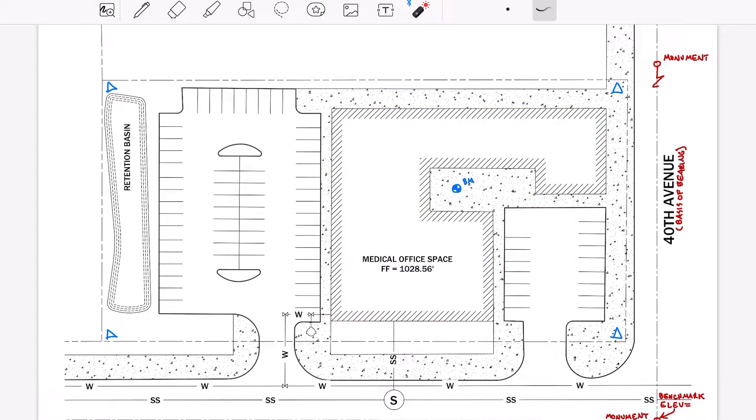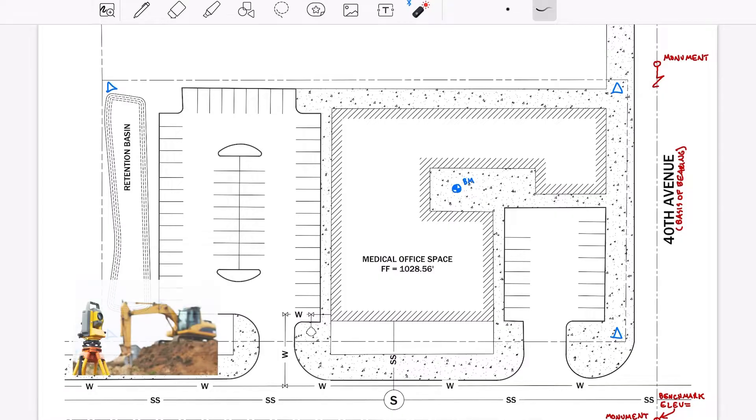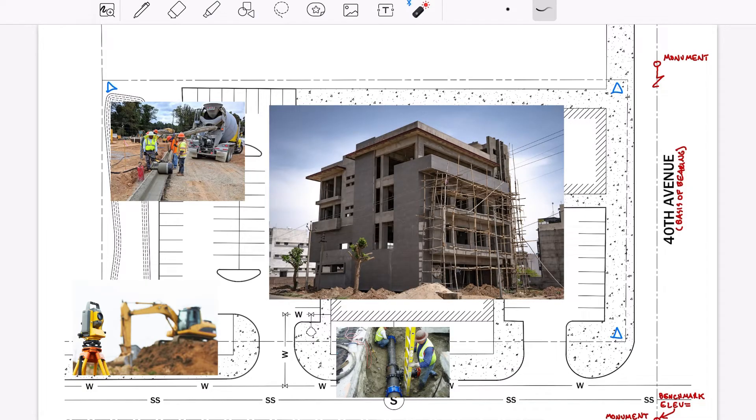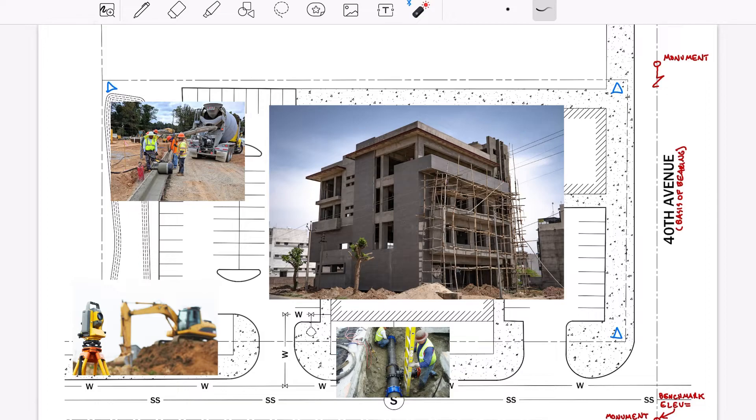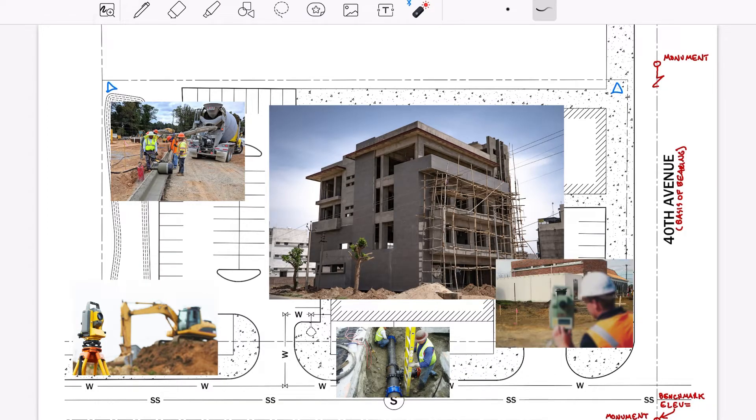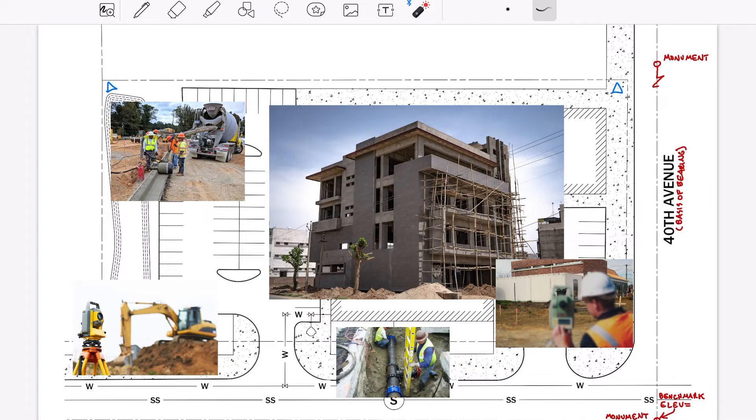Yes, one agency could address all the necessary layout on site, however, since the two sets of tasks are taking place simultaneously, the building package and its associated layout is often handled by a separate surveyor or by qualified field engineers employed by the general contractor overseeing the project.